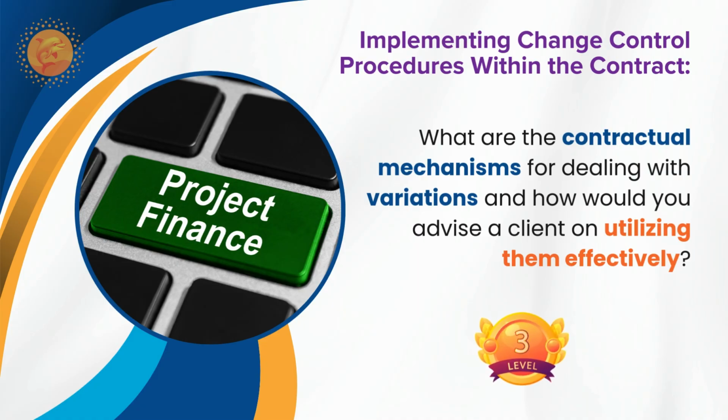If the change in quantity multiplied by the specified item rate changes the accepted contract price by 1%, and also the change in cost per unit by 0.5%, and if the item is not a fixed item rate, then a variation will be applicable, sir.